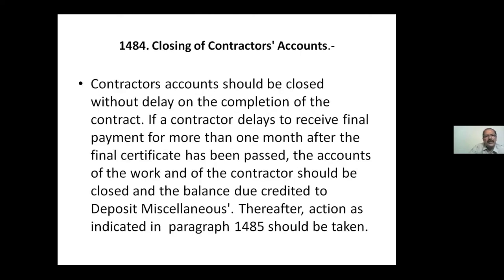Closing of contractor's account. Finally, the contractor's account has to be closed after everything is completed, after releasing the final bill, after releasing the performance guarantee, security deposit, and so on. The account should be closed as per 1484 of the engineering code.